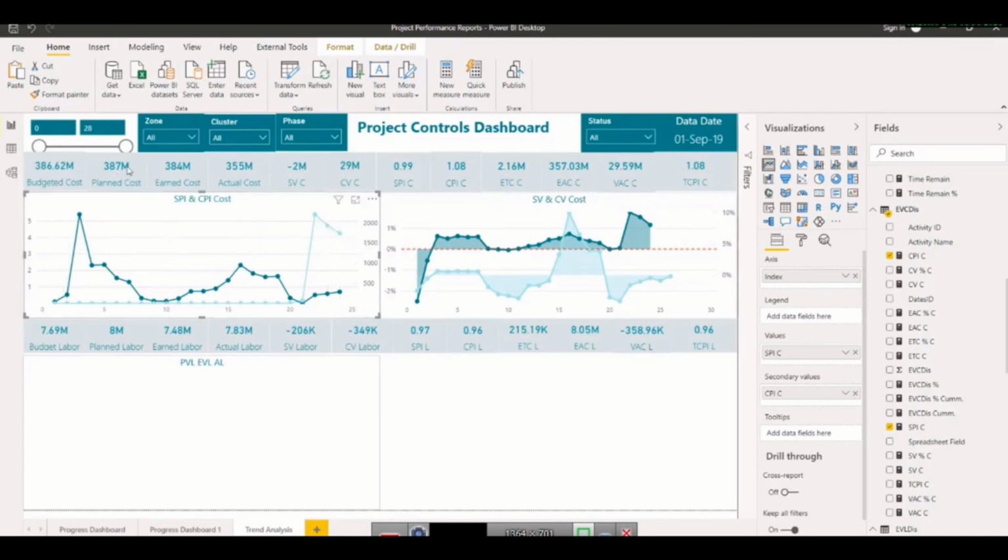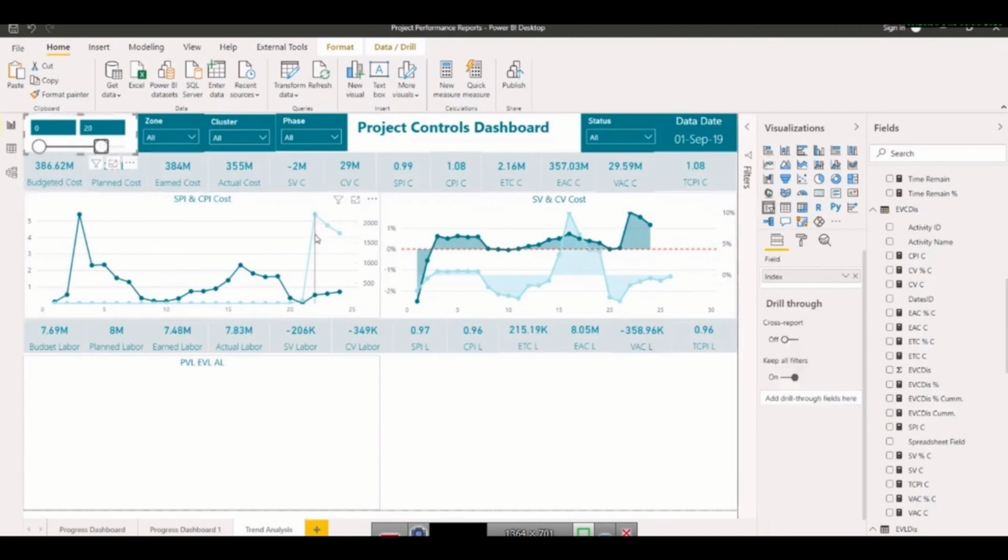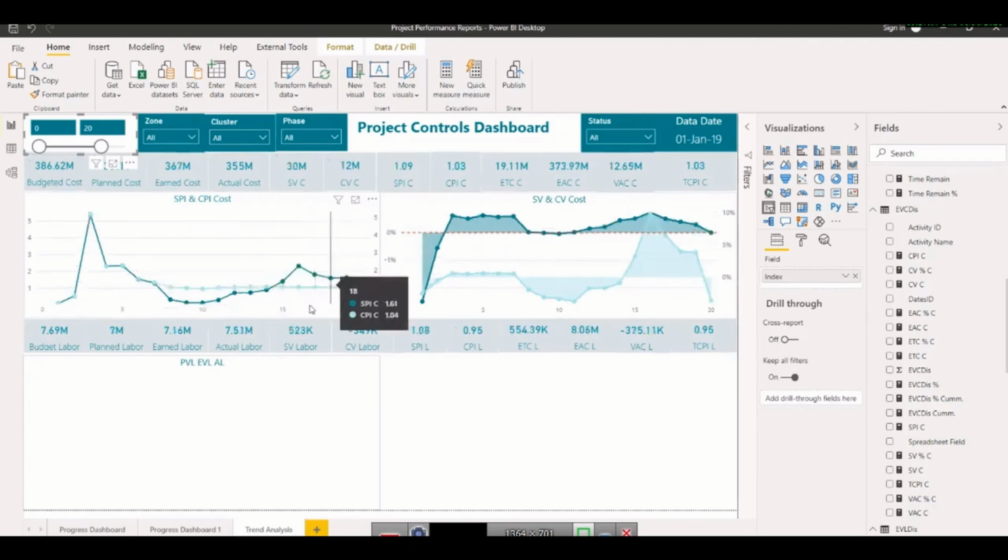See, if you see this, so what I will do, just go a little back, because this value needs to be corrected in P6. So something is suddenly put here, actual cost or earned cost, so that's why it is taking CPI a lot above, which is abnormal, and we need to just make sure. So now it seems little better.